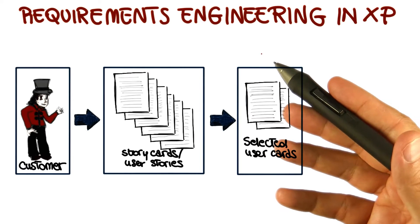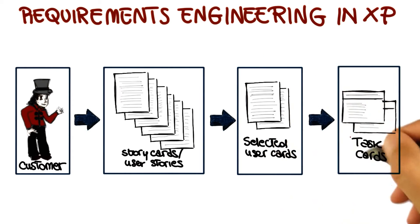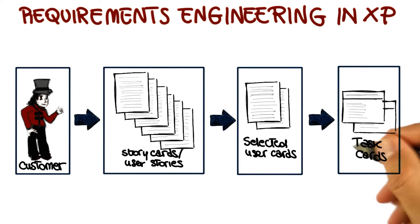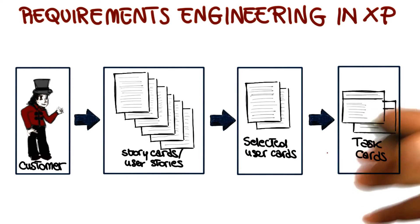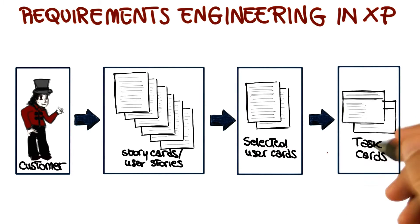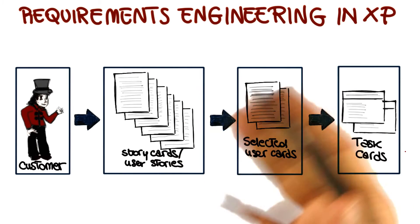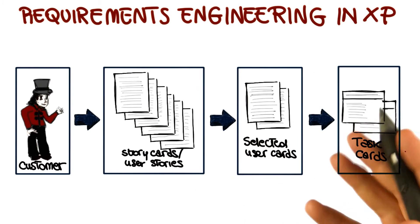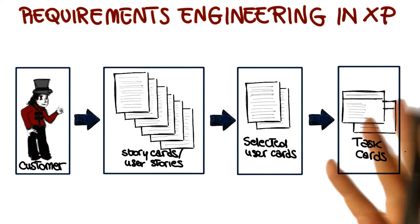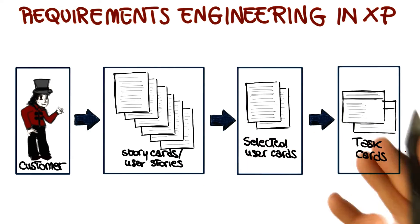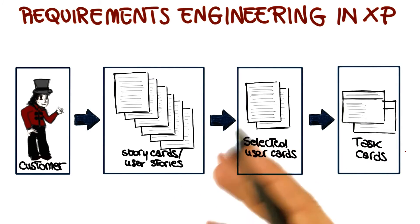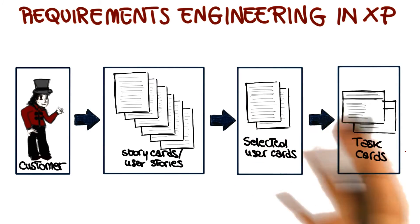At this point, the corresponding cards will be taken by the developers, the tasks will be performed, and the corresponding code will be developed. Just to give you an idea of the order of magnitude, if you consider a few months project, there might be 50 to 100 user stories for a project of that duration.